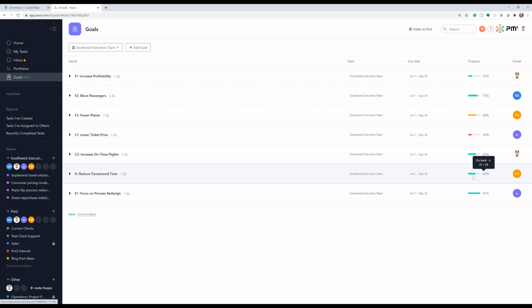But it's also colored based on how the owner assesses its score. So I'll give you an example. First off, if you think of green means on target, yellow means off target, but I can get there with some focus. Red means send help. I'm severely off target. I need either more resources or the target to get shifted by the leadership team. Here's an example where 33% of the progress has been made, but I've given it a green. I'm comfortable with 33% based on my projection. I didn't expect to be any further than that at this point in the quarter.